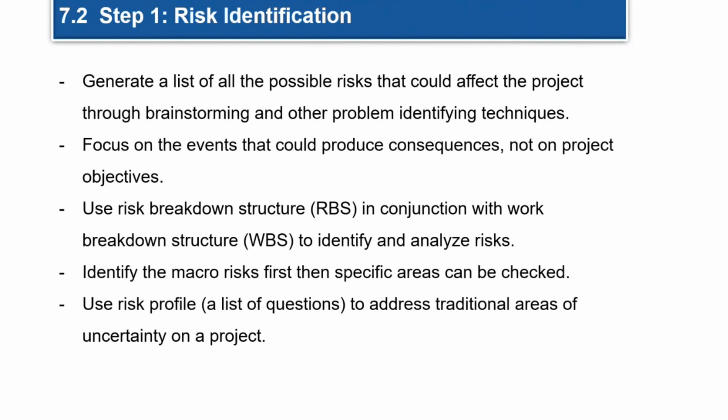And use risk breakdown structure, similar to the WBS, in conjunction with WBS to analyze different risks. That means risks can happen at many stages. It wouldn't happen just at the end of the event stage, it can happen beforehand or at other stages.